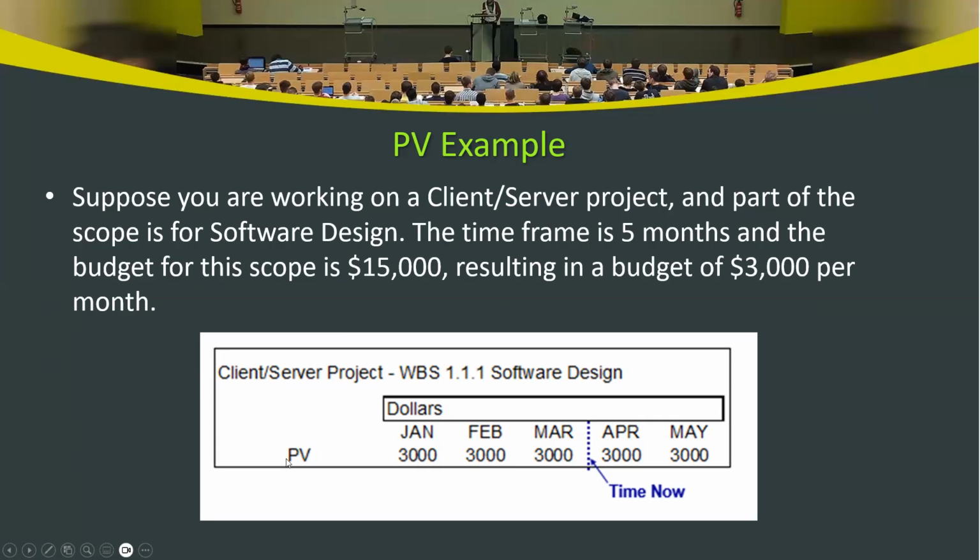So what is the present value here? Present value, periodic one. When you say March, for March we have 3,000, but cumulative all the way up to the end of March is 3,000 plus 3,000 plus 3,000, 9,000.